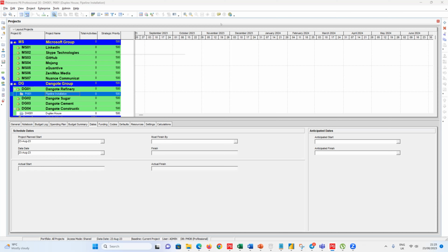So I mentioned labor, which are human beings. I mentioned non-labor, which are equipment, or call them machineries like a Caterpillar digger. And I mentioned material, which are consumables, paint, nails, something that you cannot reuse.